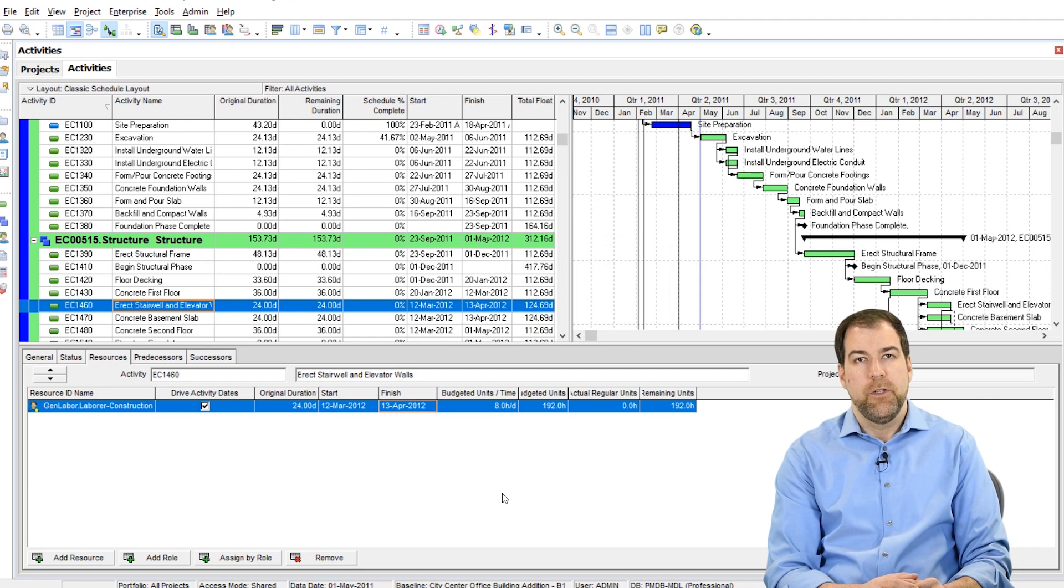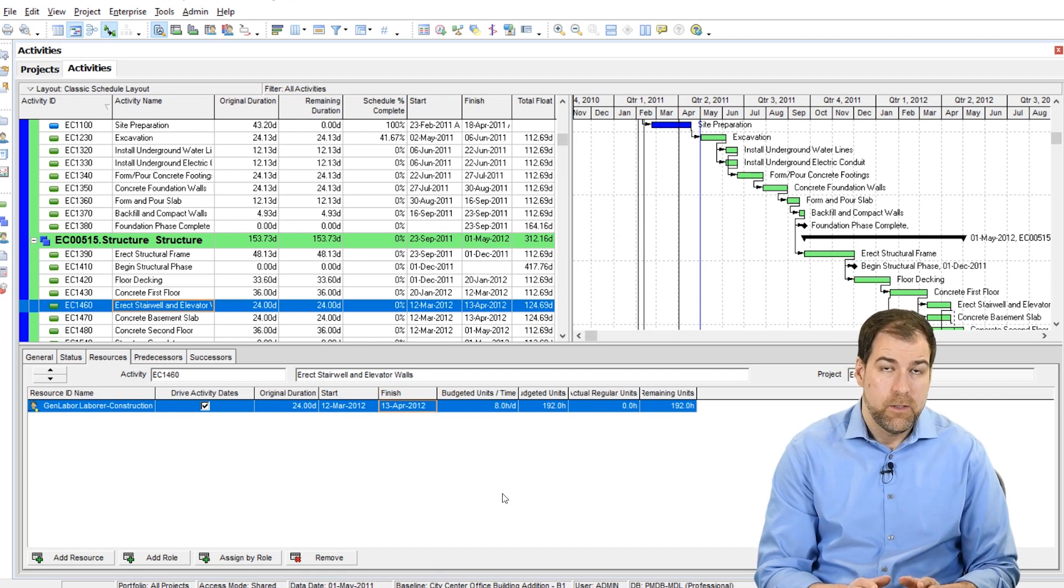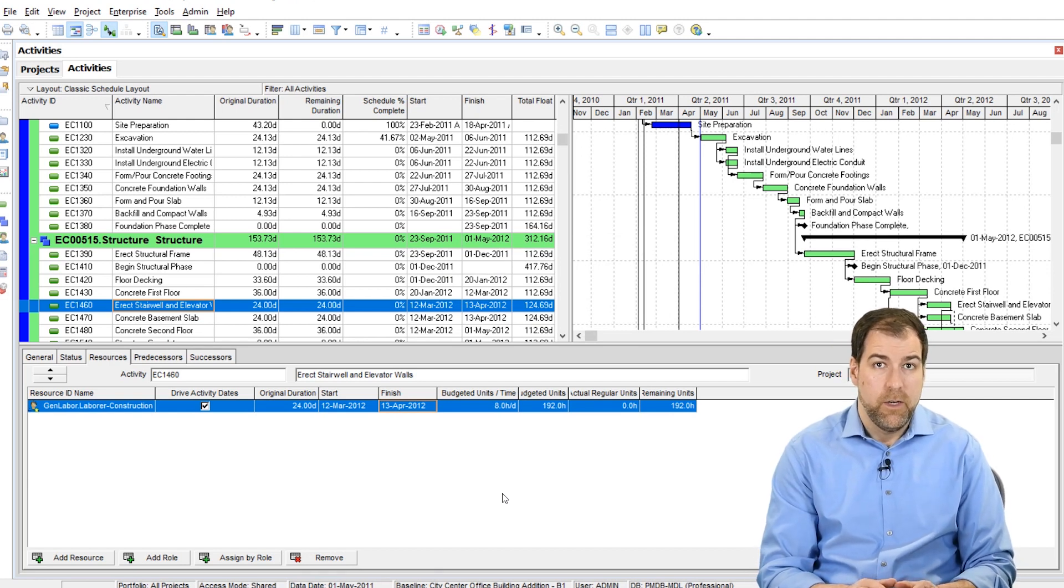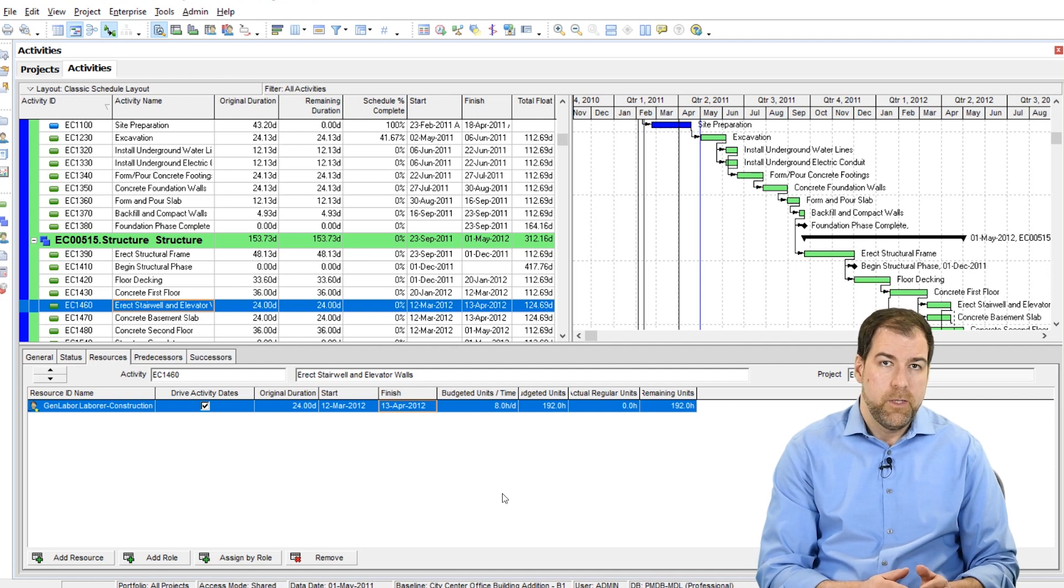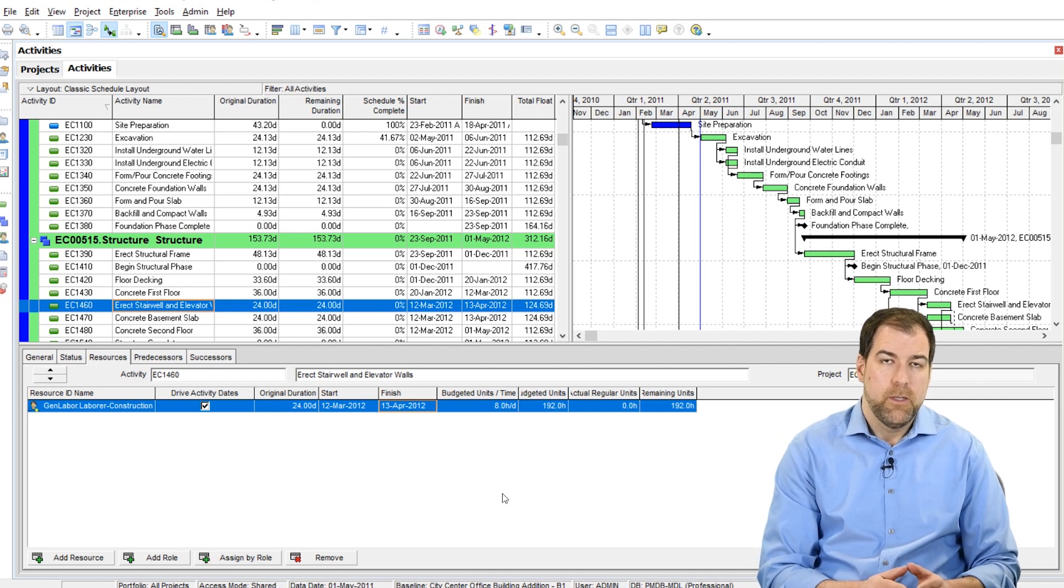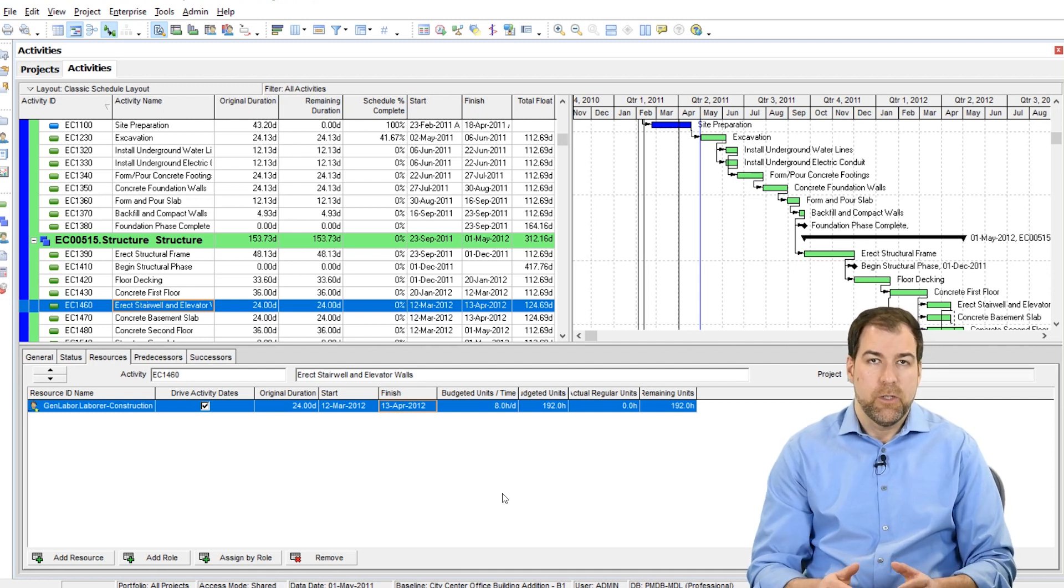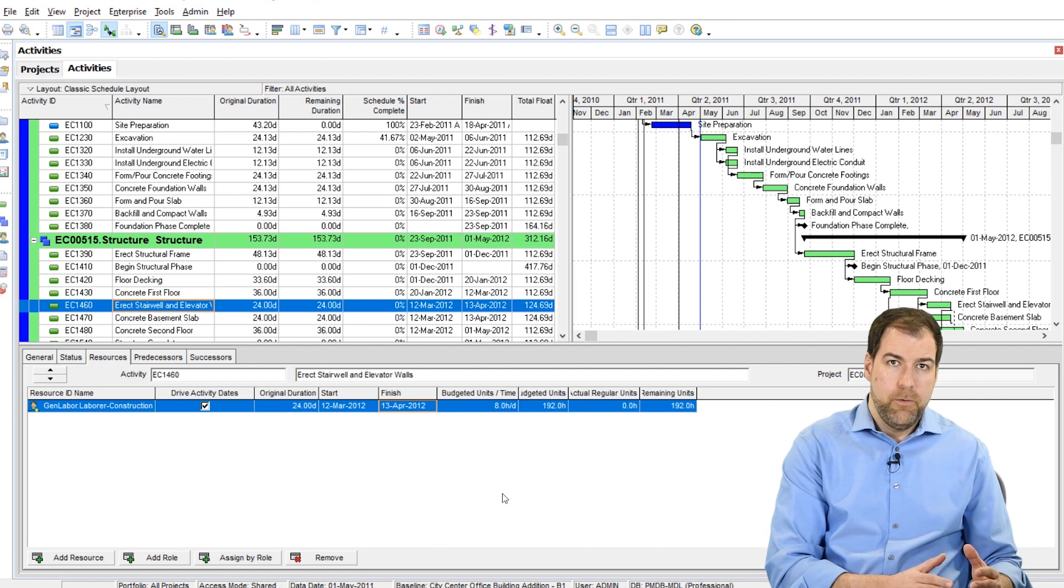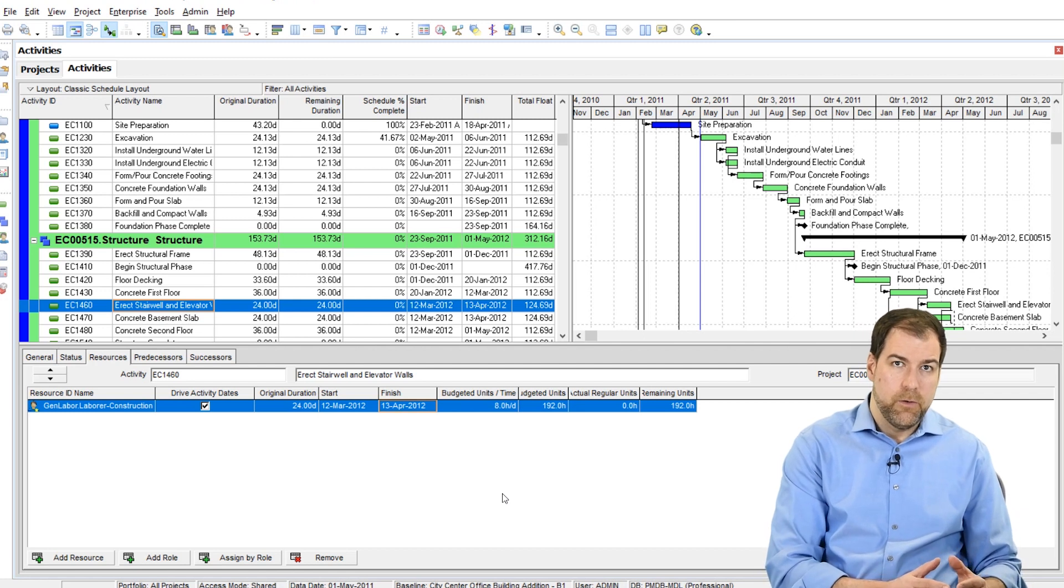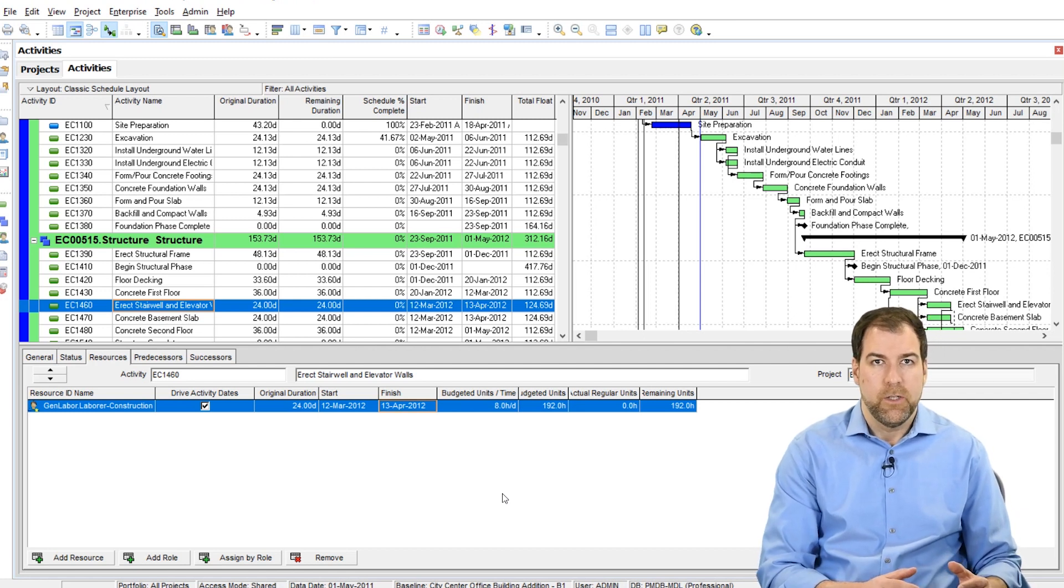So my recommendation to you is that you should always have this setting checked on. It should be a default that all of your resource assignments, their durations and their start and finish dates link up with the activity duration and the activity start and finish dates.